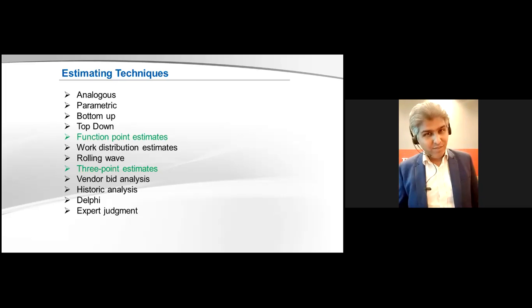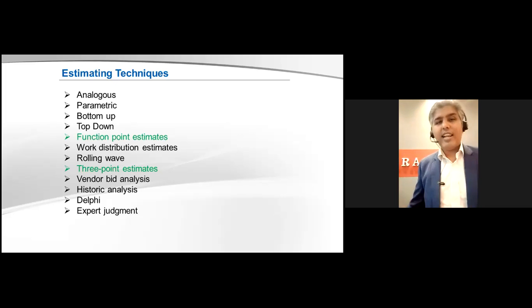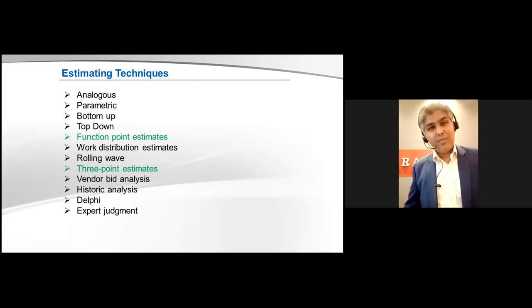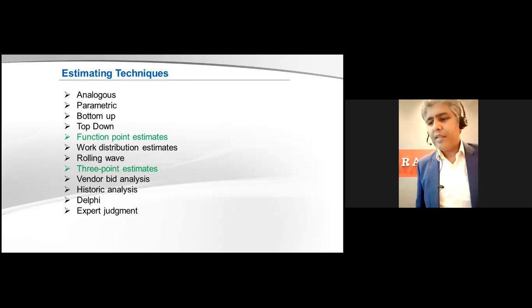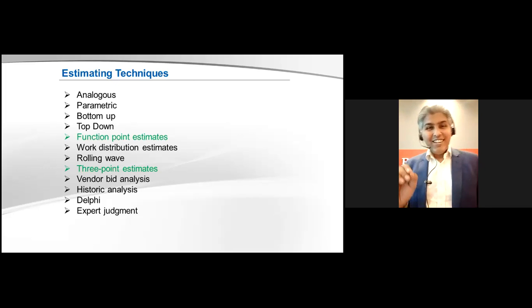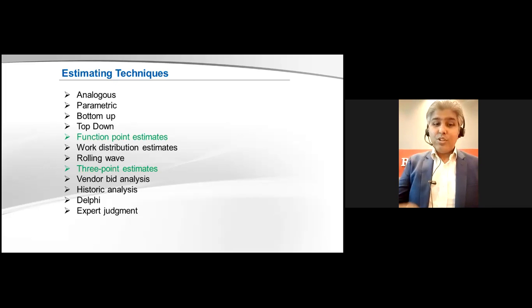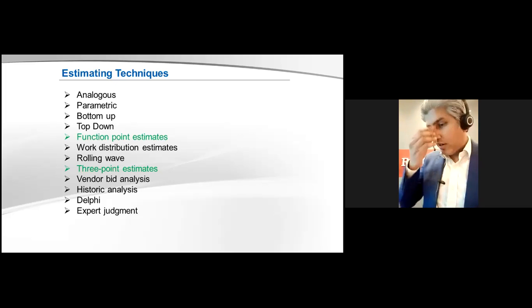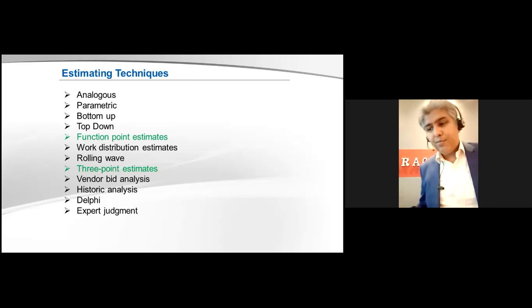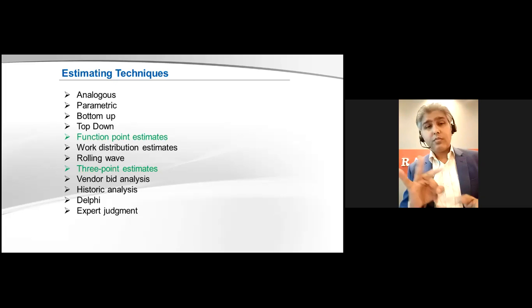So how much time does it take to prepare one design, one screen design, one report design, including two or 3 cycles with the customer? If it's complicated or not complicated, you put in the numbers. The 3-point estimate is a great estimating technique and we really use it a lot. The point of the 3-point estimate is that for one single estimate you calculate three estimations.